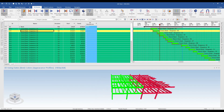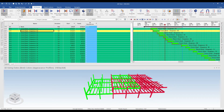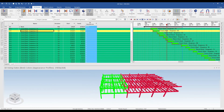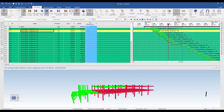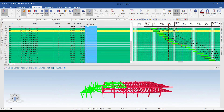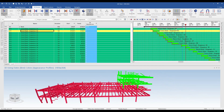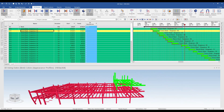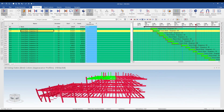This is the workflow the entire sequence follows: we have the columns and low-level beams installed first, and then once that is done we have the beams at the upper level getting installed. Going through the animation you can see this steel erection process repeating — columns first, then beams above getting installed, and so on throughout the structure.